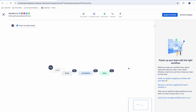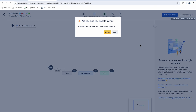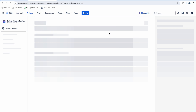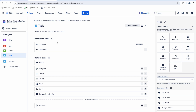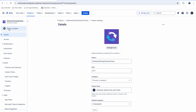We can also have more columns based on Jira statuses like 'To Do', 'In Progress', and 'Done'. In between, statuses like 'In Verification' and 'Ready for Verification' can also be added. To do this, go to options and click 'Manage Workflow'. In manage workflow you can create more process steps for your Jira project. Most companies have 'In Verification' and 'Ready for Verification' statuses.